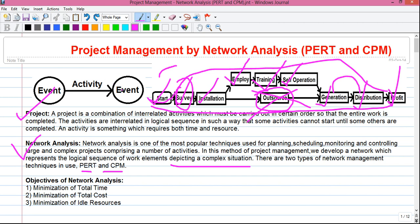An event is also called a node because from any event more than one activity can start, and to an event more than one activity can end. For example, if all three executives fly from New York to London on three different dates, each travel is represented by a separate arrow. The travel of each executive is one activity — represented by three separate arrows.